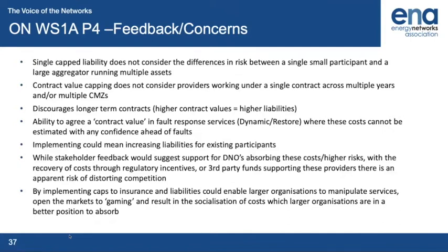options, the single cap liability doesn't consider those differences between small participants or groups of small participants and a large aggregator running multiple assets. We also identify that there is a particular issue in that contract value capping doesn't consider providers working under a single contract across multiple years.